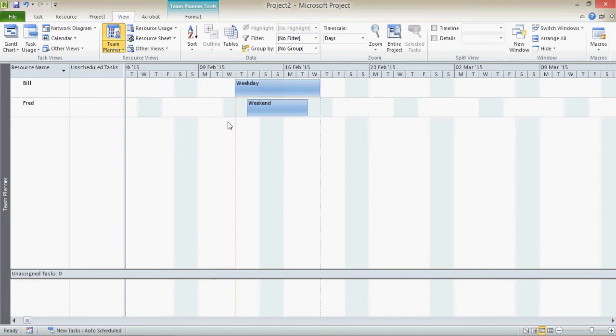You'll notice that the first day of the weekday task is actually the Thursday, here being today, and the Thursday Fred can't work because that's part of his weekend and that's why it's shifted into that gap there.